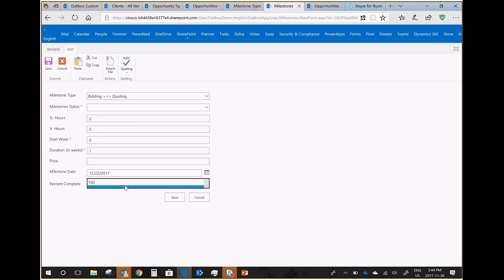Okay. Yeah. So where it was before is we can configure this to match our milestones to a T, and we also have the ability to attach files. Now, the reason this is important, the reason this is what some of our customers are using, attach a file here as opposed to attach it in the general documents area, is, you know, sometimes it's nice to have the actual deliverable attached to the milestone that it was delivered with.